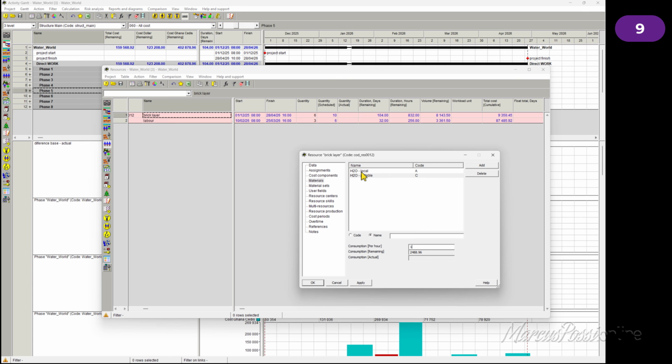Anyway, this bricklayer at the end of his work probably wants to take a shower. A shower bath may spend 100 liters for each worker. 100 liters divided by 8 hours a day means that this worker spends 12.5 liters per hour in a day. When you assign this bricklayer to your work, it will also bring water, potable or drinkable, and common local water, not important.